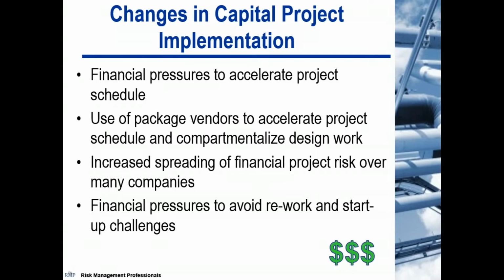So what's been driving this over the past decade or two? Basically, when you're working on large capital projects, usually you've got different groups, different parts of the country, different parts of the world that need to work together, share information, and move quickly towards a result, getting a plant built and operated to minimize that time when you're in the design phase and the construction phase, which is when you're not making money to support the reason why you're doing the capital project in the first place. So really there's a lot of financial pressures, and more financial pressures now, to accelerate project schedule. That's been driving the need for remote collaboration and remote PHAs.